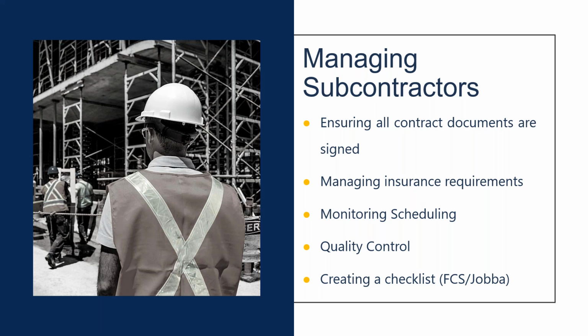And a lot of contractors, roofing contractors and other trades I talk to, talk about just relying on a COI, okay, certificate of insurance. And look, that's better than nothing. But honestly, I'm not even that tech savvy. I can get on a computer here and fake a COI in about 5 minutes. It's not very hard, especially if you've got PDF Pro or something like that. So what I recommend is really asking for the policies.